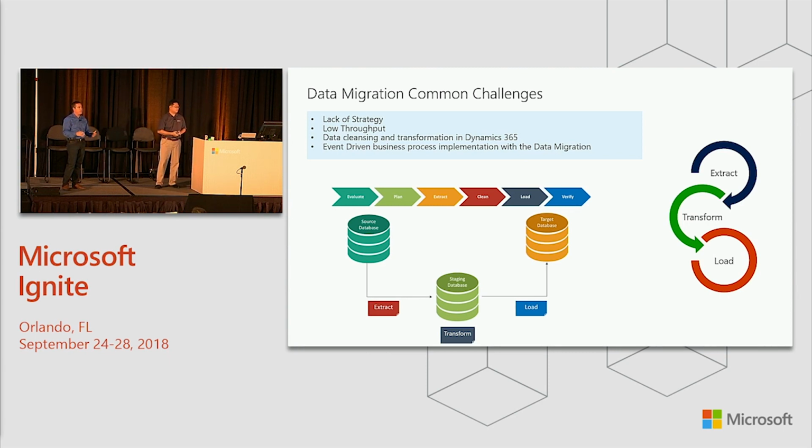That could result in a tremendous volume of cases. But the thing about that scenario, especially with cases, is that a lot of times those old cases are closed, and by definition they're inactive. They're not really being worked on. You can think about strategies when looking at a scenario where you've got a long-running data migration to achieve, to perhaps preload that information that really isn't going to change, by definition of how the data sits and is arranged in the legacy system.